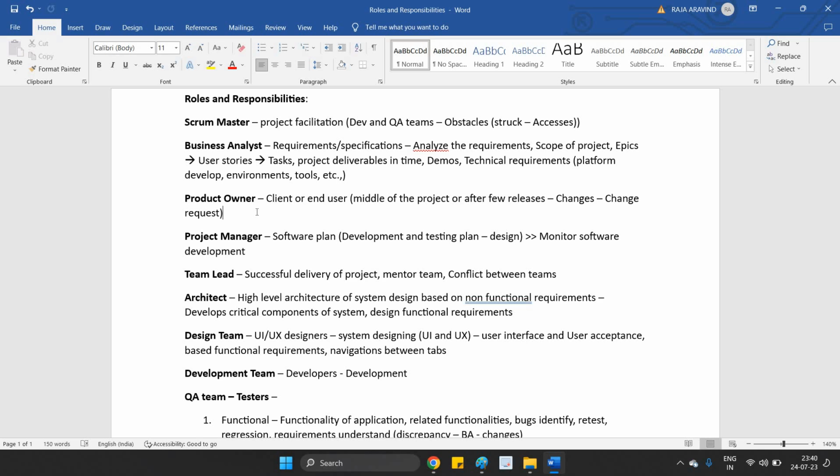If you create a bug that is exactly linked to a user story, then when it is opened in the dashboard, you can see that bug in the user story itself. That is called a sub bug. Standalone bugs are created once the user story is closed. Sub bugs are created by the QA team while the user story is in progress.